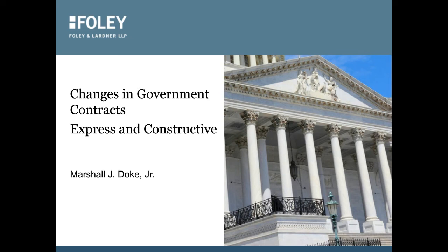Now, a change that is beyond the scope of the contract is called a cardinal change, and a cardinal change is just one that you don't have to accept if it's beyond the scope of the contract. Now, the changes clause also provides for an equitable adjustment in the contract price if the change causes an increase or decrease in the cost of or the time required for performance of the contract. And failure to agree on this has to be resolved by the disputes clause.